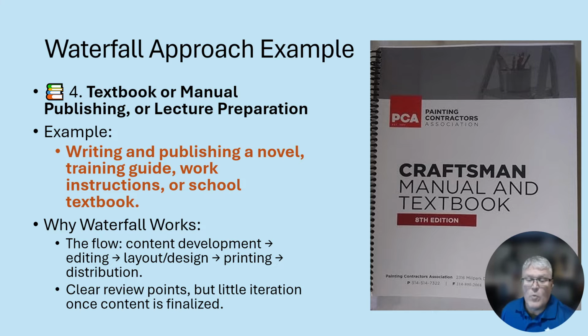Here's another example of a waterfall approach. Textbook or manual publishing, or even lecture preparation. Writing and publishing a novel, training guide, work instructions, or even a school textbook. Why does this work here? The flow is pretty standard. You have content development, you write it, you edit it, you determine the layout and design, then it goes to print, then it goes to distribution. There are clear review points, but little iteration once content is finalized.